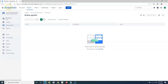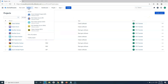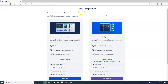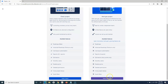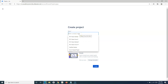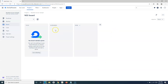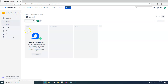This is about the classic scrum project. If you want to create a next-gen scrum project, the process is exactly the same. Go to View All Projects or click on Create Project — it will open the same window. Click on Select Next-Gen Project, change the template to scrum, and provide the project key. For example, I'll say 'Next-Gen Scrum Sample.' The unique key gets assigned automatically, then simply click on Create. The next-gen scrum project will get created successfully and you will be redirected to the scrum board.